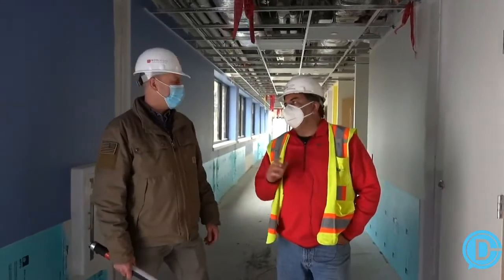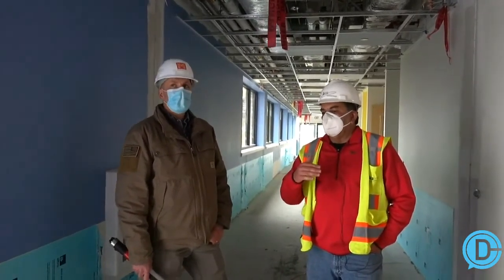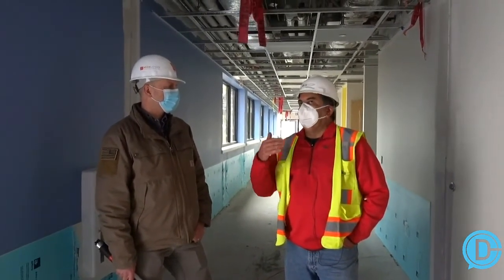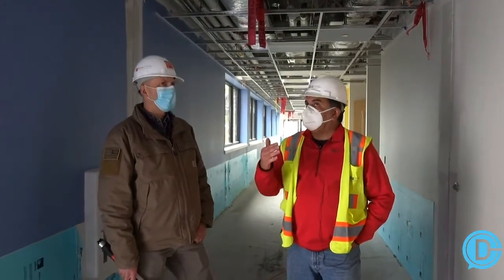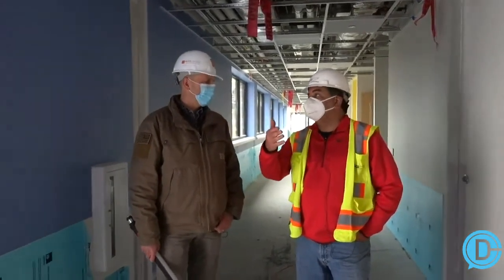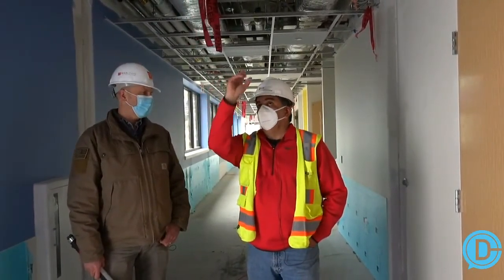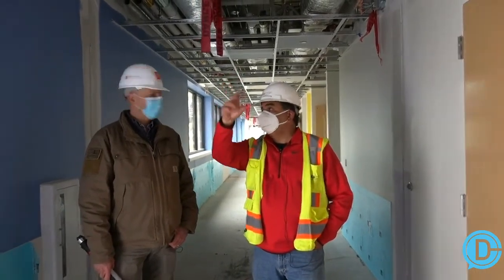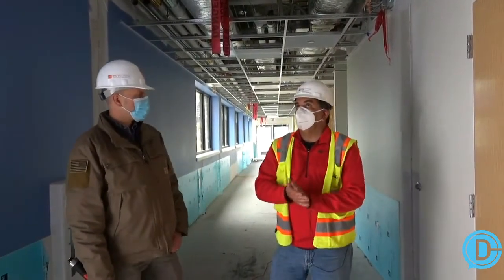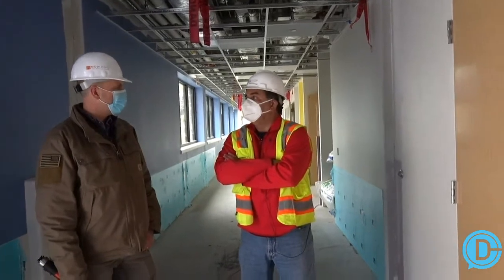Oh, that's great. No, the biggest challenge we're going to have, quite honestly, is actually getting the work inside the facility done. Until they have reduced a few more numbers of patients in there, we're just not going to be able to start the work inside. It's not a lot, but we haven't been able to do everything that we were scheduled to do, because typically in a situation like this, we would already have had all of the interior work done and the utilities waiting here with shut-off valves on that side of the wall, and we would have made these connections next week. Unfortunately, with the events that have evolved over the last 2 months, we just couldn't do it. They were just jam-packed.